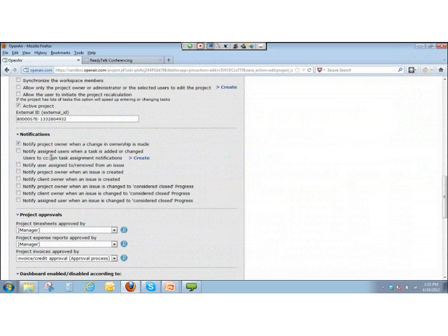But one feature I do see people using, and that's the last one on the list, which is the issues assignment. And really the issues assignment and indication of closure is sort of a manual workflow. There's no request for approval, approved type exchange. It's more of a, hey, I need you to work on something, and then when you're done with it, you close it, which sends an email to the project owner to say, I'm done with it.